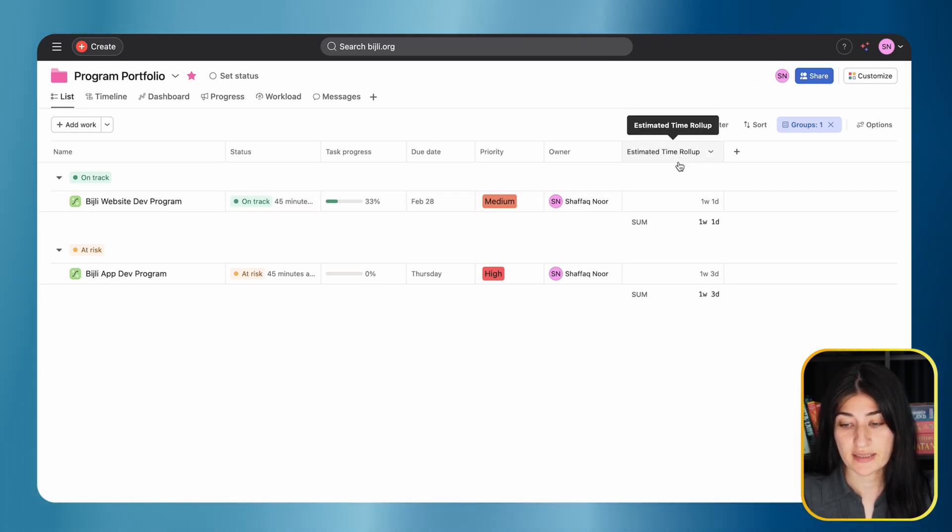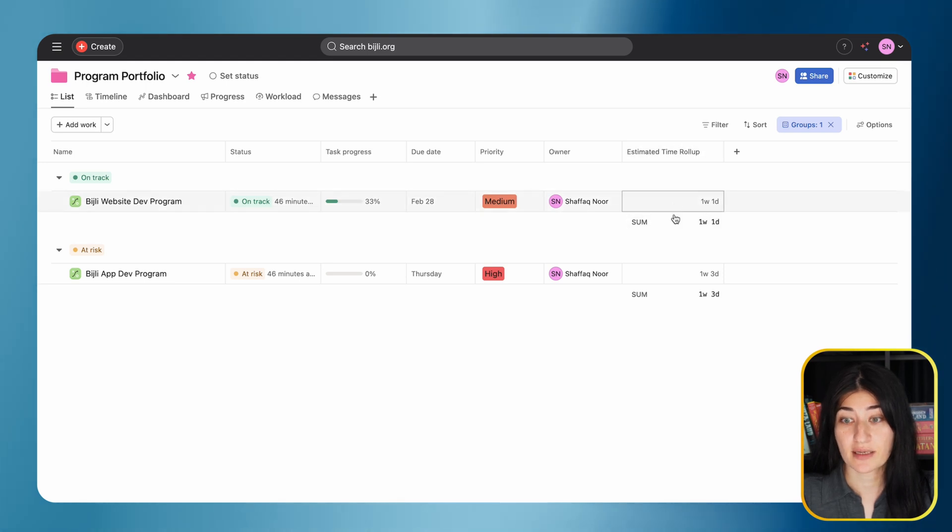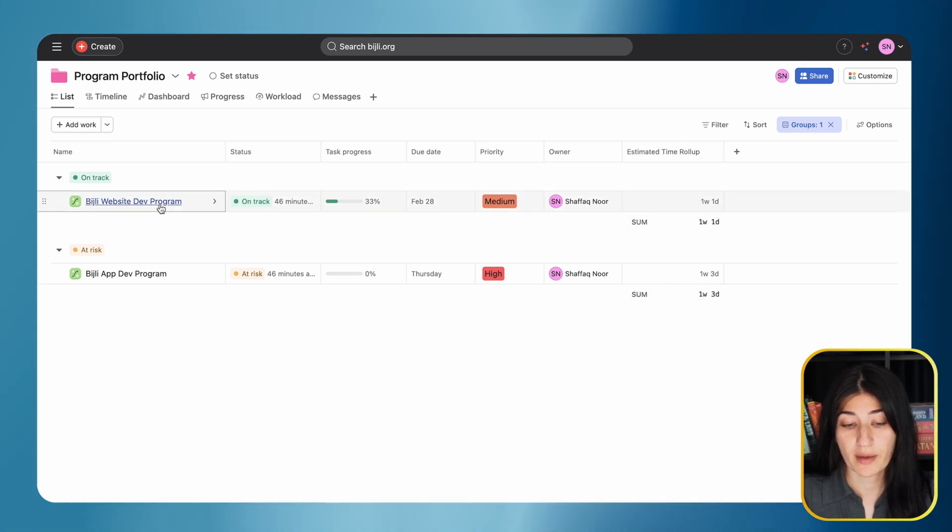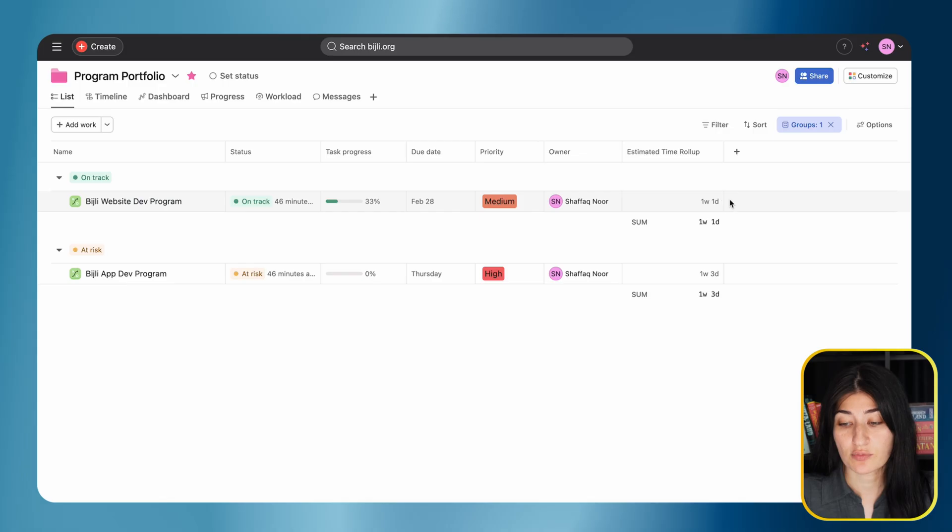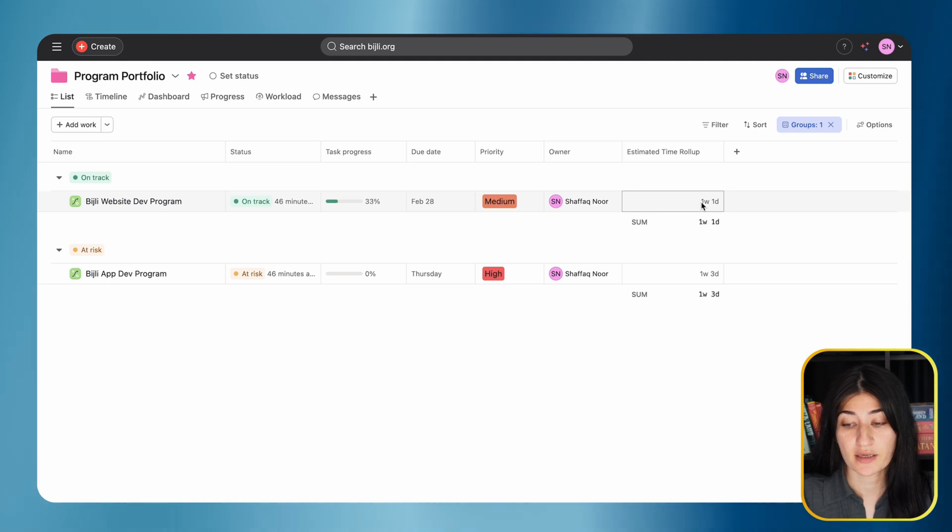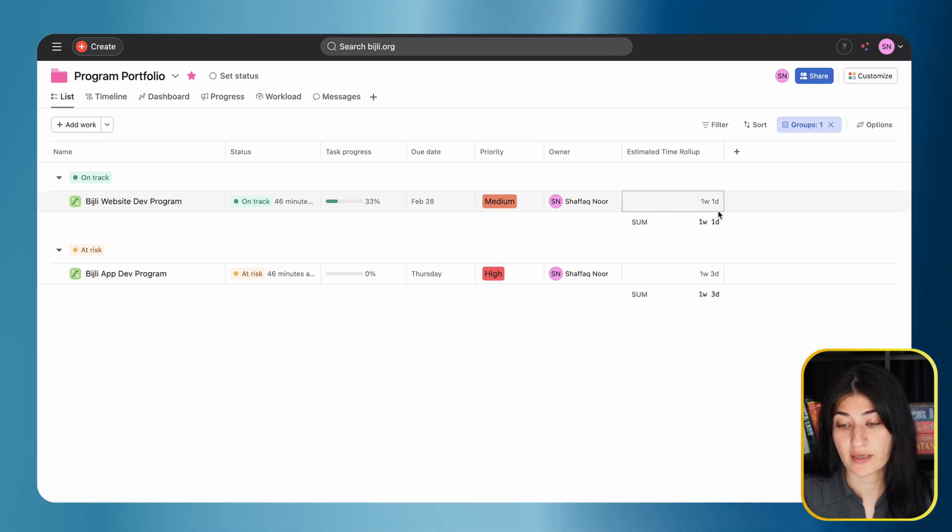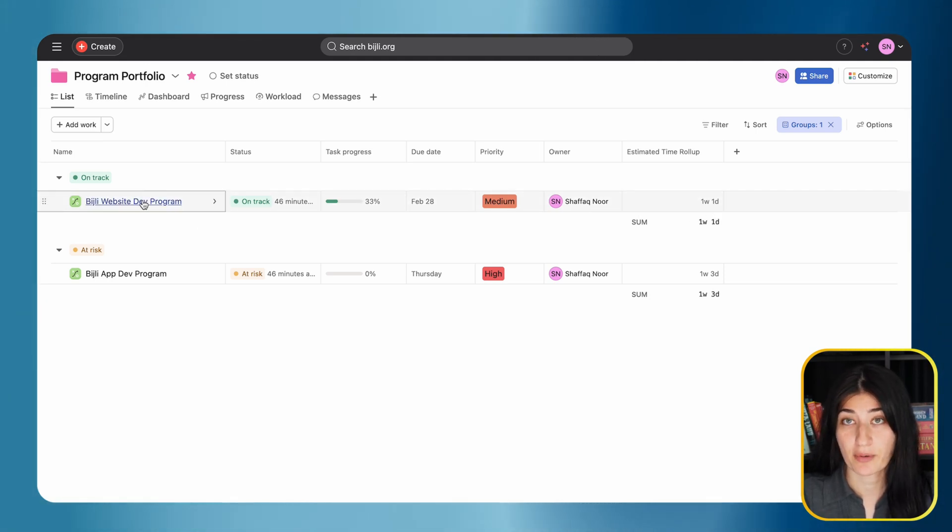Here I already have an example created: an estimated time roll-up. What this means is for all of my projects in these programs, the time that's been estimated for those projects is rolling up into a sum. It's telling me my total is one week and one day of estimated time for my projects.